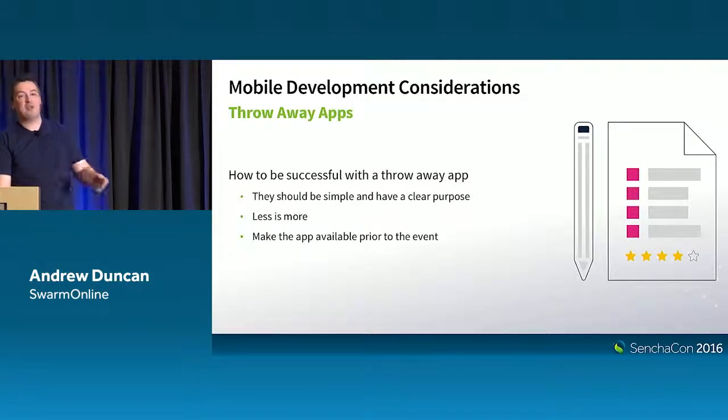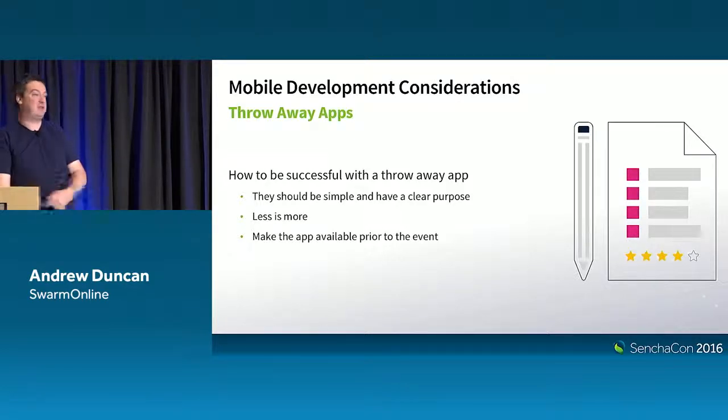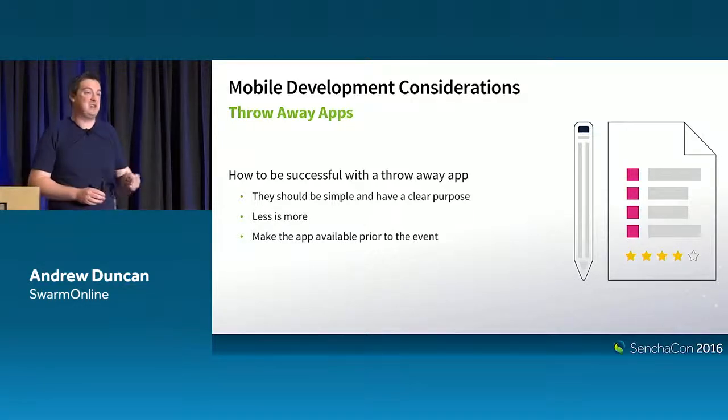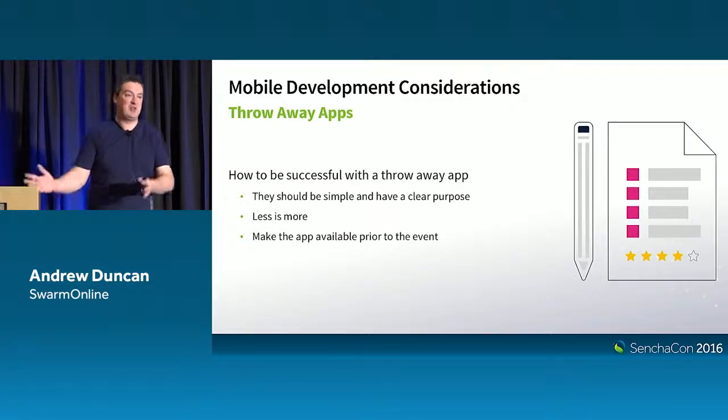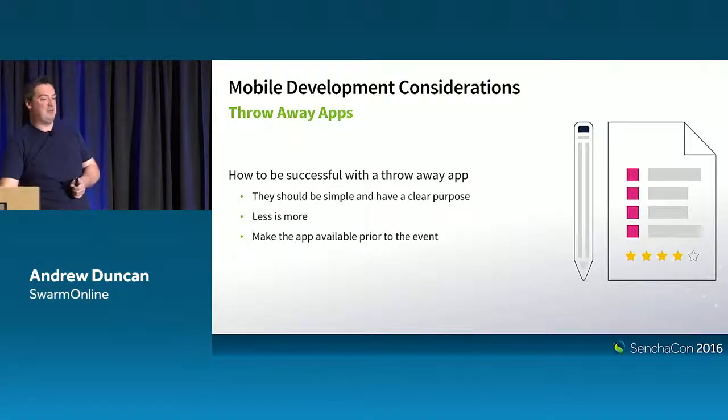So if you're not already publishing to the App Stores, there's a bit of a rigmarole to get there. You need to sign up with Apple and then go through various verifications and so on. That takes time. And then actually deploying your app to Apple's App Store takes a couple of days. It's not just an instant thing. They go through a review period. You do your deployment, get all your source code together, submit it to Apple, and then it normally takes about two to three days for Apple to review it, and they may reject it.